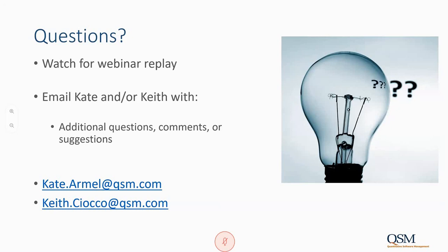And that's really the best practice, because industry data is incredibly helpful when you're starting off and you don't know what your own capability is. But if you're able to collect historical data and feed it back into your estimation and benchmarking process, that's when you really get the payoffs, because you can see whether you're improving over time and you can base your estimates on your current capability as it changes, because it's sort of a moving target.